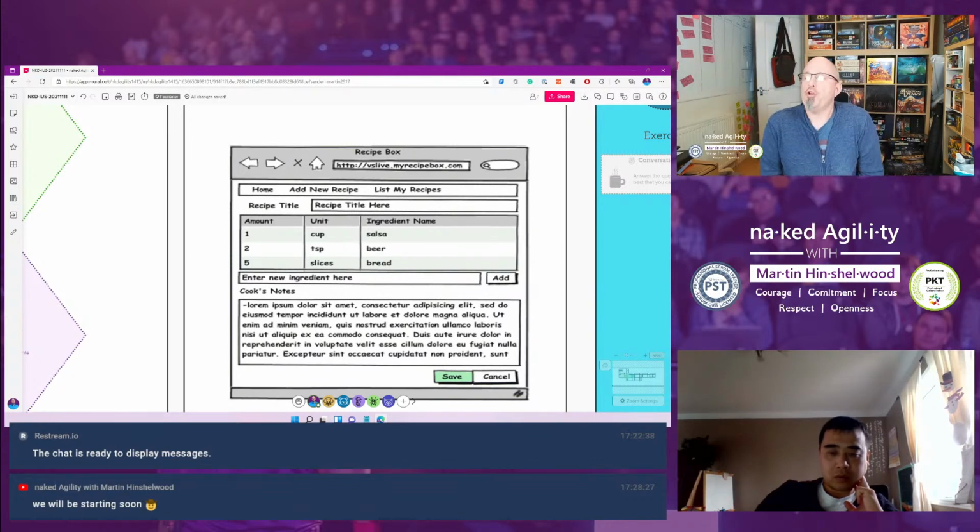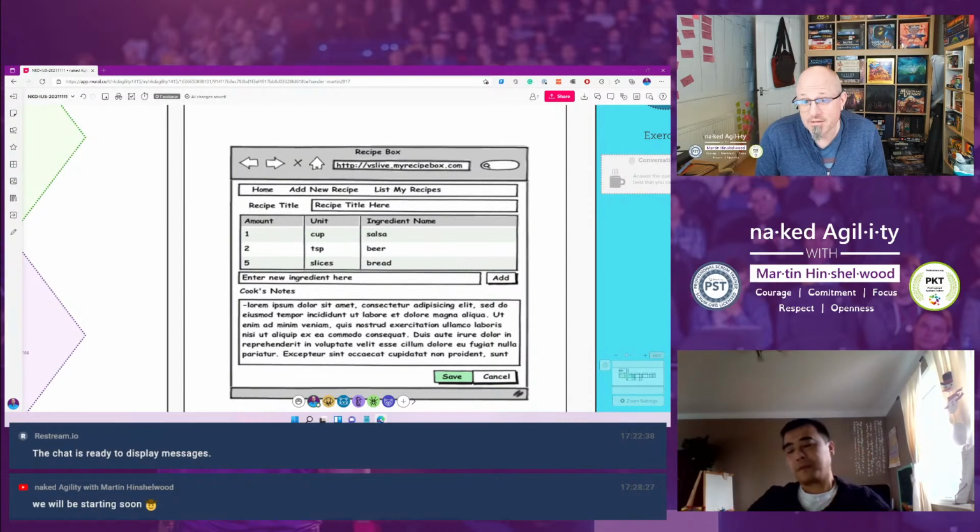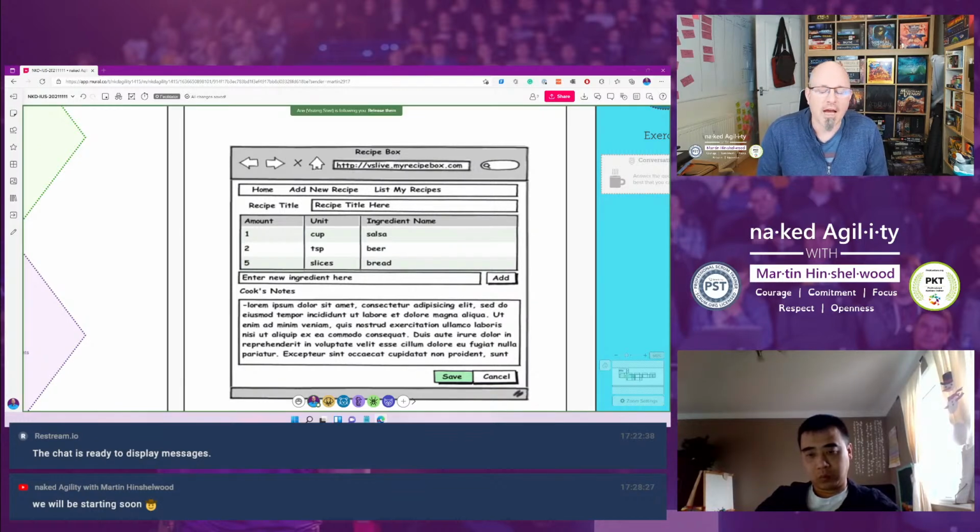If you are not describing users accessing your system, then probably using user stories is not a good idea. If you're describing how APIs interact because you're building an API that some development team hooks onto, I don't expect to see user stories in your backlog. That is not going to be conducive to writing things in a way that everybody can understand it.